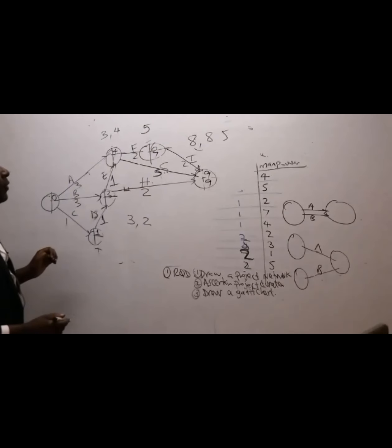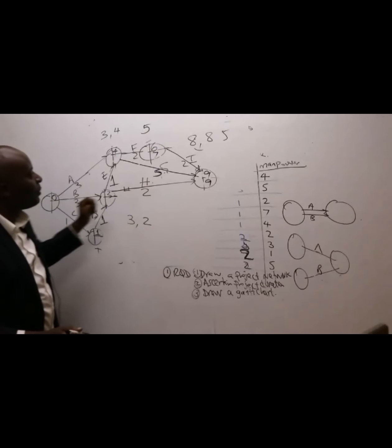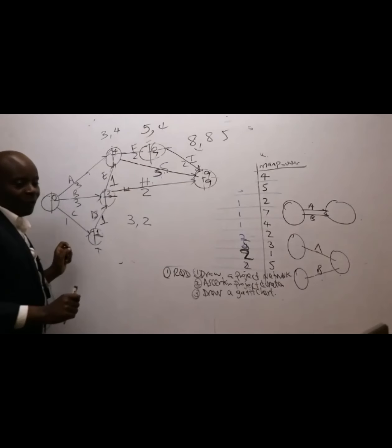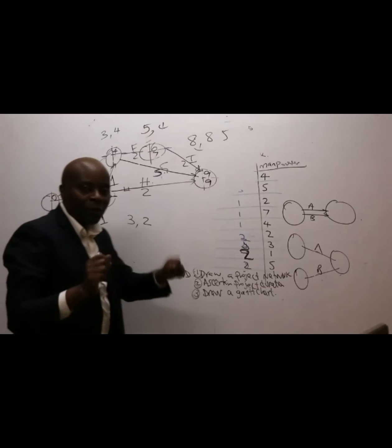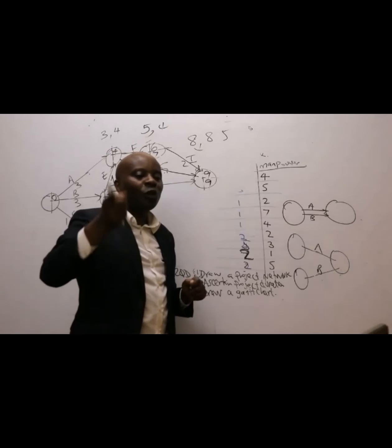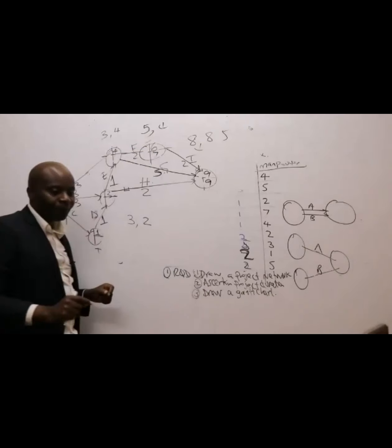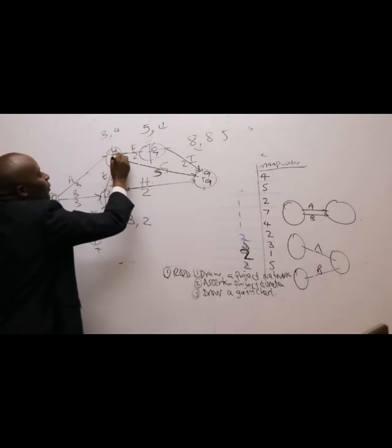Right? 5. And then we have here 9 minus 5. 9 minus 5 gives me what figure somebody? This is beautiful. So ladies and gentlemen, between the 5 and the 4 in the backward pass, are we going to pick the higher or the lower? Backward pass, we normally pick which one here somebody? The lower. So in this case, the one that will prevail here is 4.